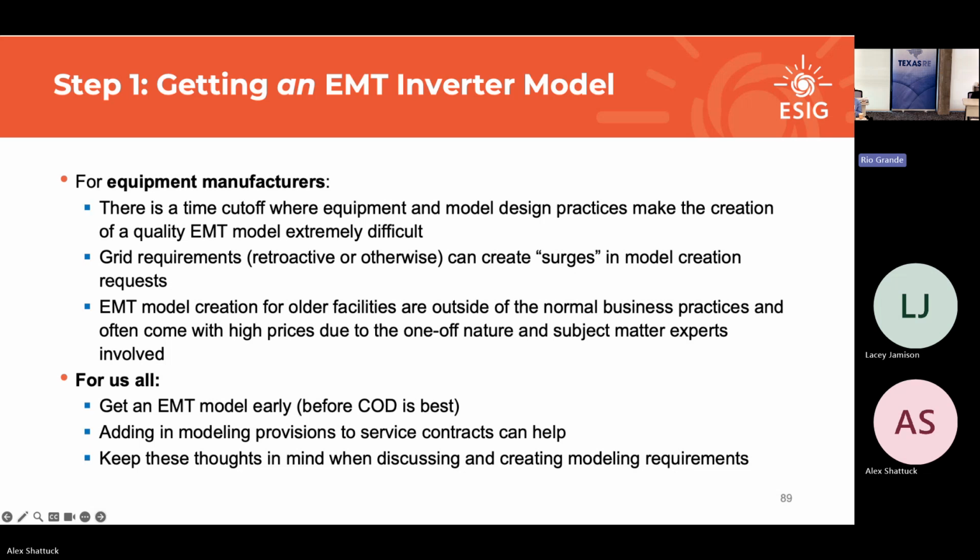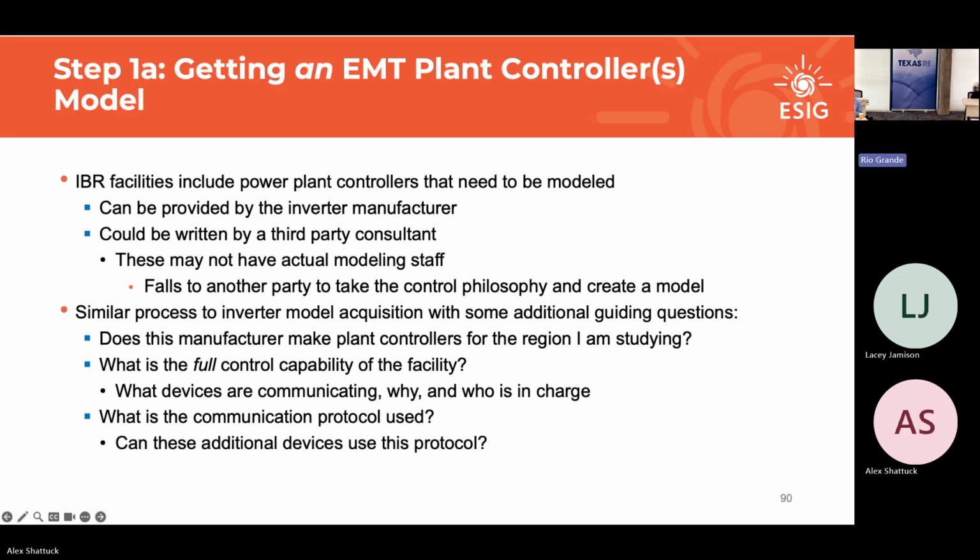Adding your modeling provisions into your service contracts is also really great, especially in EMT where different compiler changes, different software changes, different software versions, Windows things require updates. Windows updates might require model changes. So having something in your service contract for models to say, if something changes, give me an updated model is very useful, or else you're stuck in the cycle of asking for bespoke models all the time. And keep all of this in mind, everybody, when we talk about making model requirements, if any of you are involved in those type of modeling requirement discussions.